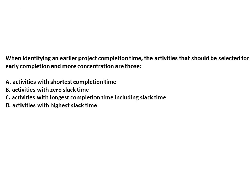Regarding project duration and identifying earlier project completion time: the activity with slack time of zero should be selected for early completion and given more concentration. Always remember — whenever slack time is zero, that activity is critical. Alternatively, any critical activity has by default zero slack time, so those are the critical activities requiring early completion.